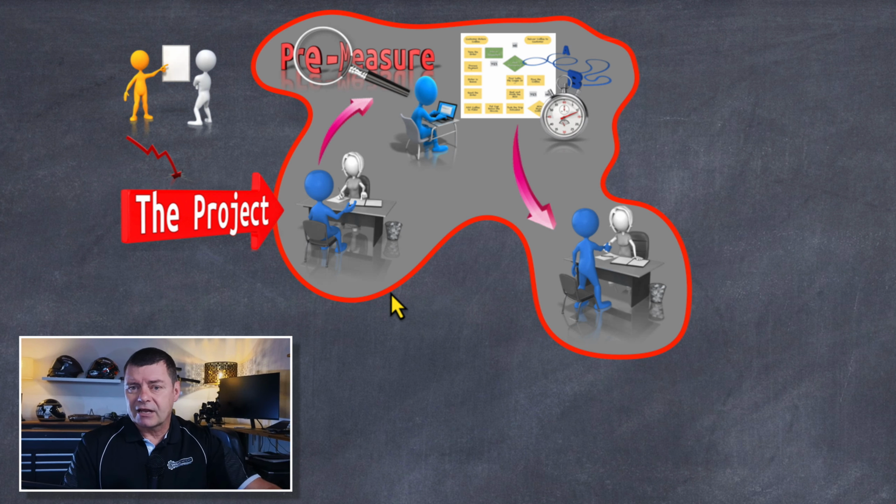They then leave that meeting because they don't have all the information they need to plan a project at this point. So what they will do is they'll go out and do what we refer to as pre-measuring. They will go to the workplace, to the work area, wherever it is that the performance gap exists, and they will have a look at the process. They might spend a couple of days doing that, because what they're going to do in the pre-measuring is observe it and collect data. It might be some sort of process mapping that they do, or they collect physical data from some sort of system, or it might be time data, or data associated with movement. Whatever the case may be, it depends on the type of problem that they're looking at.